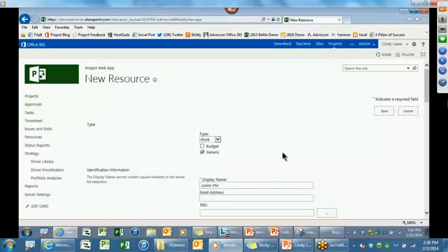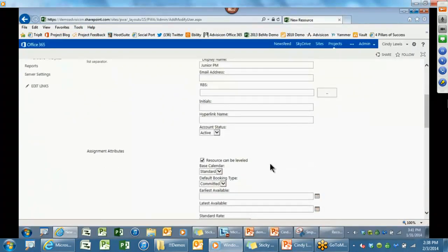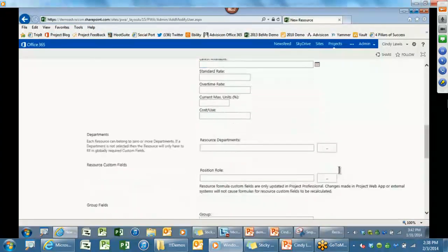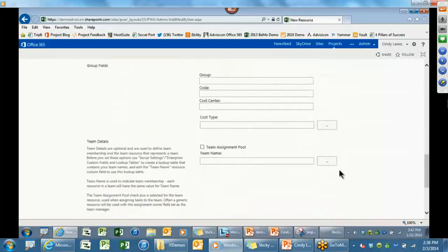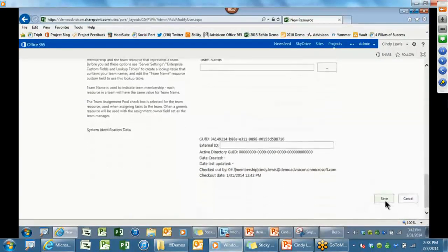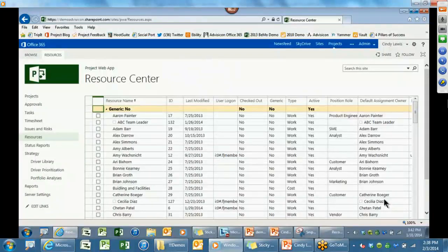How you do that, and you're seeing me do that right now, is you set up a resource, and it's simply an option. I want the default setting for this resource to always be proposed, so I could show and hide things. I've got a customer right now who is setting up all their generic resources as proposed. They add them into the Resource Center, and they say, I'd like to flip those on and off to do my evaluation. So that's what I'm doing right here: I've set up the resource as proposed.